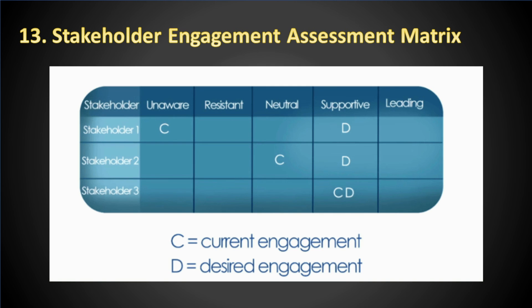The Stakeholder Engagement Assessment Matrix is a simple yet powerful project management technique to document desired and monitor actual engagement levels of stakeholders. It helps identify potential gaps in the involvement of stakeholders.